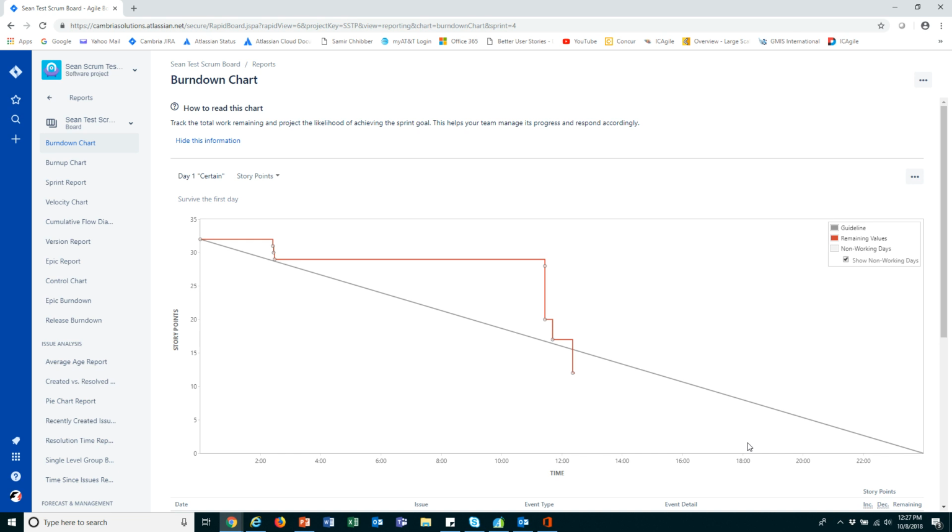All right, and if that happens, our planned sprint, the priority is really important. Having that set, because if we need to pull in some additional work, that should be the next story that we pull in, is the top story in our next planned sprint.